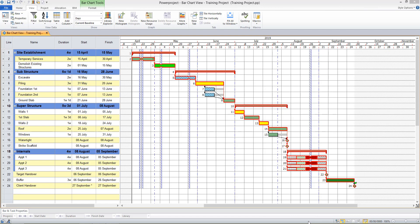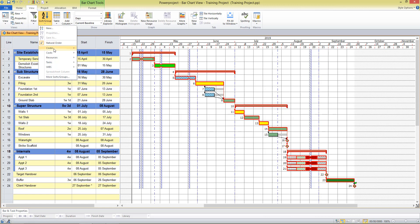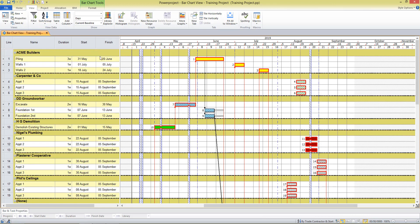Another useful way to report your project information is to sort or group. Whereas a filter shows specific items from your project, a sort or group will reorder or group it in a specific way. Keeping with the contractor example, this sort will allow me to see each contractor by start date — you can see it's separated into each group and the activities they are doing in my schedule. The dotted lines represent page breaks, so when printing we can scale the printout and use the defined page breaks, giving one page for each of the different trades. To remove the sort, click on the sort name at the bottom of the project screen.